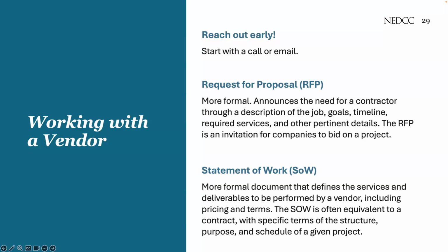The statement of work, or SOW, is what it sounds like. It's a statement of all the work you expect the vendor to do in very, very detailed terms. So things like, how files will be named, how various types of damage might be handled. It typically makes up a portion of the request for proposal, but in many cases, especially for smaller institutions, it can be the entire request for proposal.